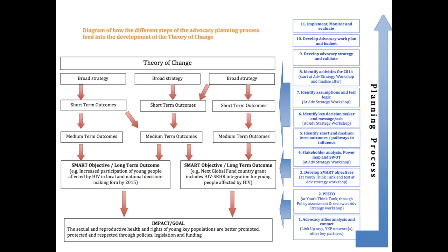Then you work back to the medium term. Then you work back to the short term. So therefore, they're always arranged backwards. It's no point in starting at the beginning because it's counterintuitive. You do need to start from the end and come towards you, and therefore it makes much more meaningful outcomes that you can actually achieve.